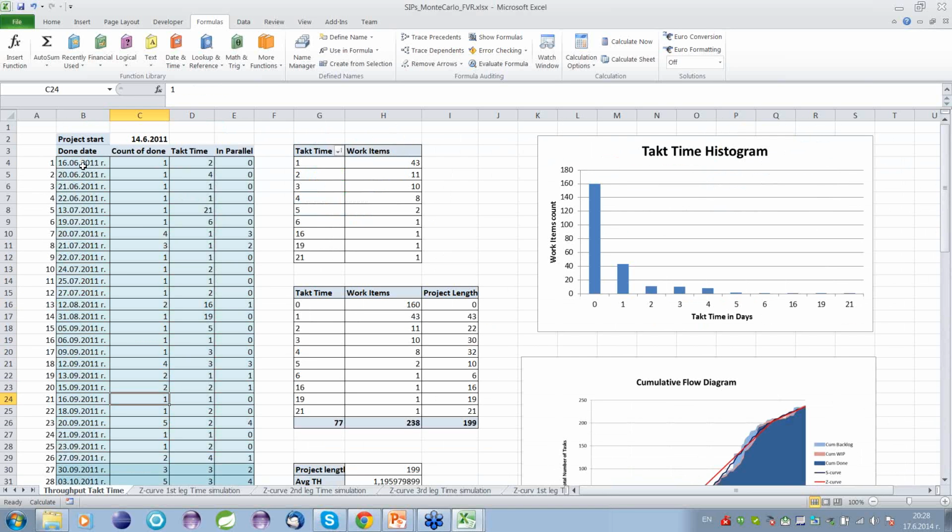We'll be using this project for calculating the stochastic information packet for this kind of project, and we will be using it for predicting delivery time for similar projects. Next, in column D, we have the tag time for each delivery date. It is a very simple formula, you can see in Excel. Actually, by the way, Excel files are publicly available, and you can play with them yourself.